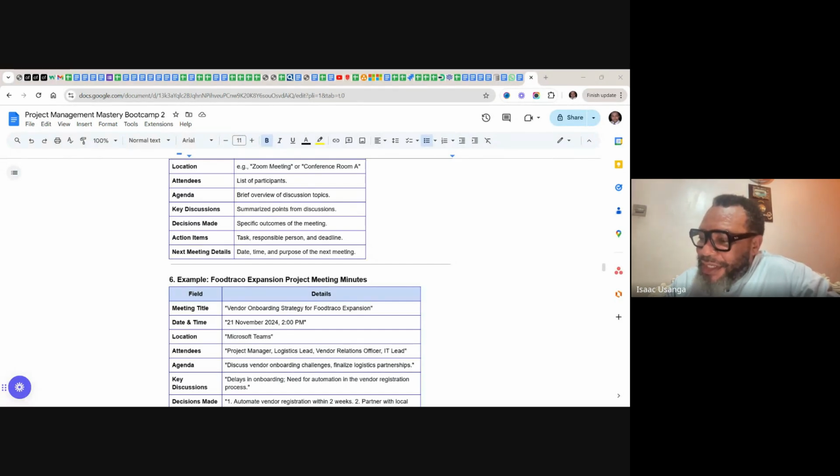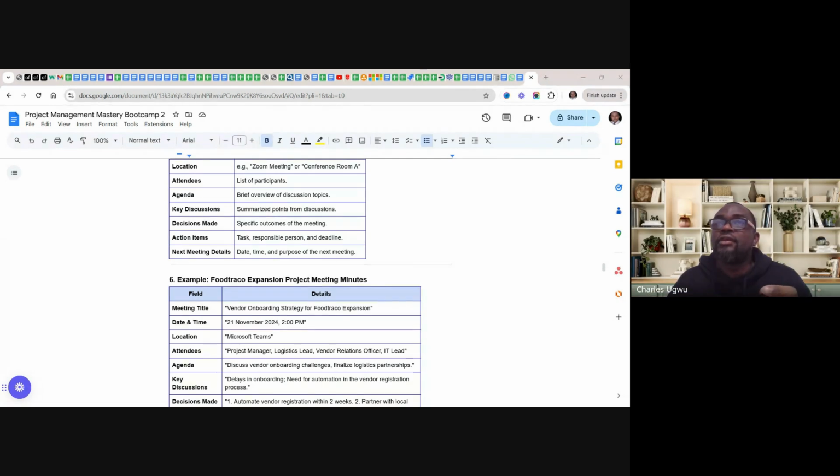What about stand-up meetings that we hold every day, just for 15 minutes, and it just addresses three things: what we did yesterday, what we're doing today, and maybe issues and challenges? Do we still have to make minutes of such? Of course, very, very important.